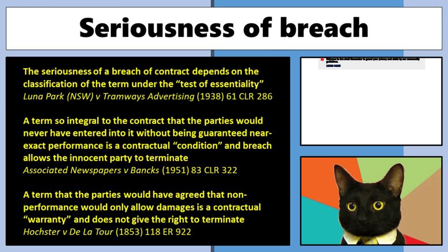That, if it's breached, actually gives the innocent party the right to terminate. To actually say, no, we are terminating at this point. We are going to go and seek compensation through the courts. Or, in the case of the boat, for example, if I haven't paid yet, I am not going to pay. Right, this boat's got a hole in it. It's a substantial breach of the contract. Here's your boat. I'm not going to pay. All right, that is what we call a contractual condition.